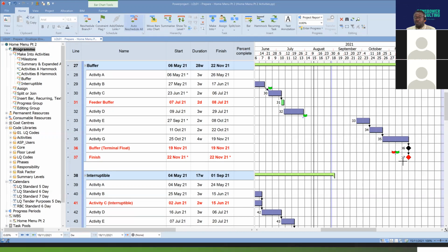The construction director does not want anything flagged to the ops director as an issue. So once it gets to amber, he's finding ways to mitigate the issue. And then, of course, the construction manager who is flagged with the green, the fact that we're in delay, does not want to get to amber as well, because he doesn't want the pressure from the construction director on himself. So that is the mechanism, in practice, of how you manage a buffer. And I hope that answers your question, Harry.